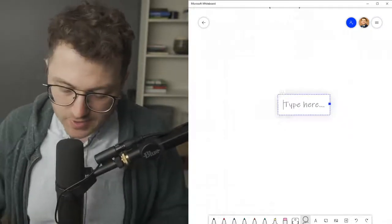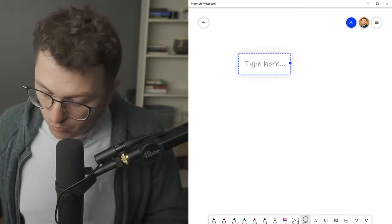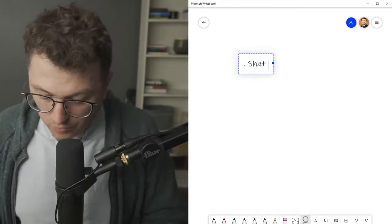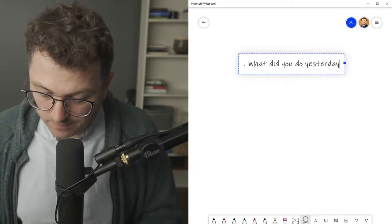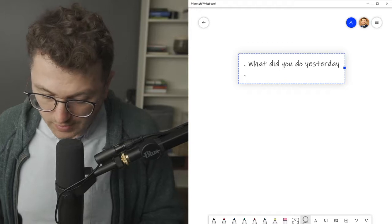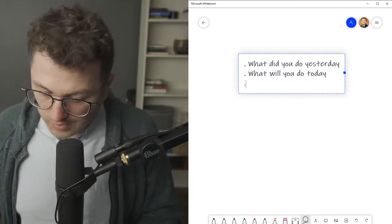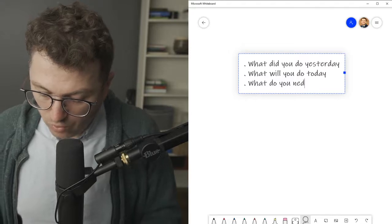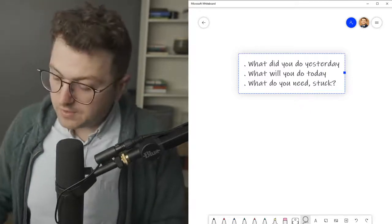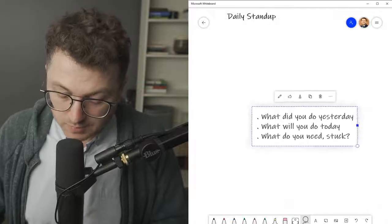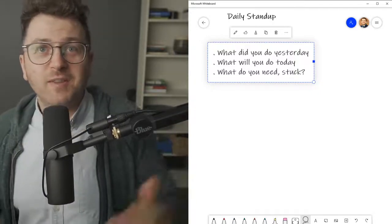So let's get to the three main questions that are part of the daily stand-up. Question number one: what did you do yesterday? Question number two: what will you do today? Question number three: what do you need, or are you stuck? These are the three questions the scrum master asks the development team. That's it — everybody answers them.